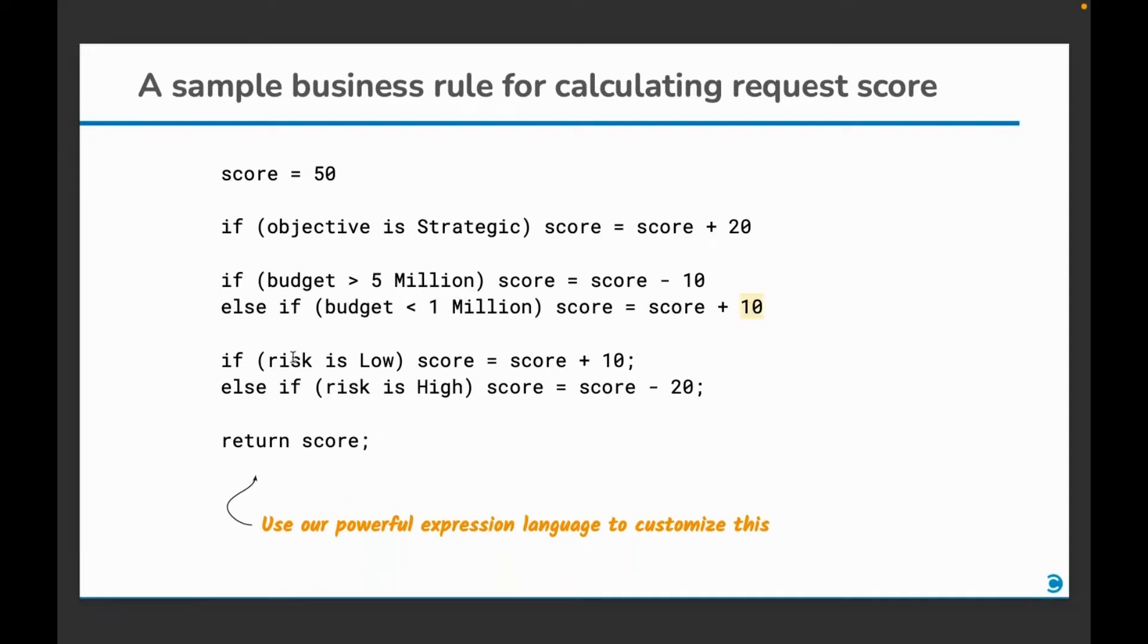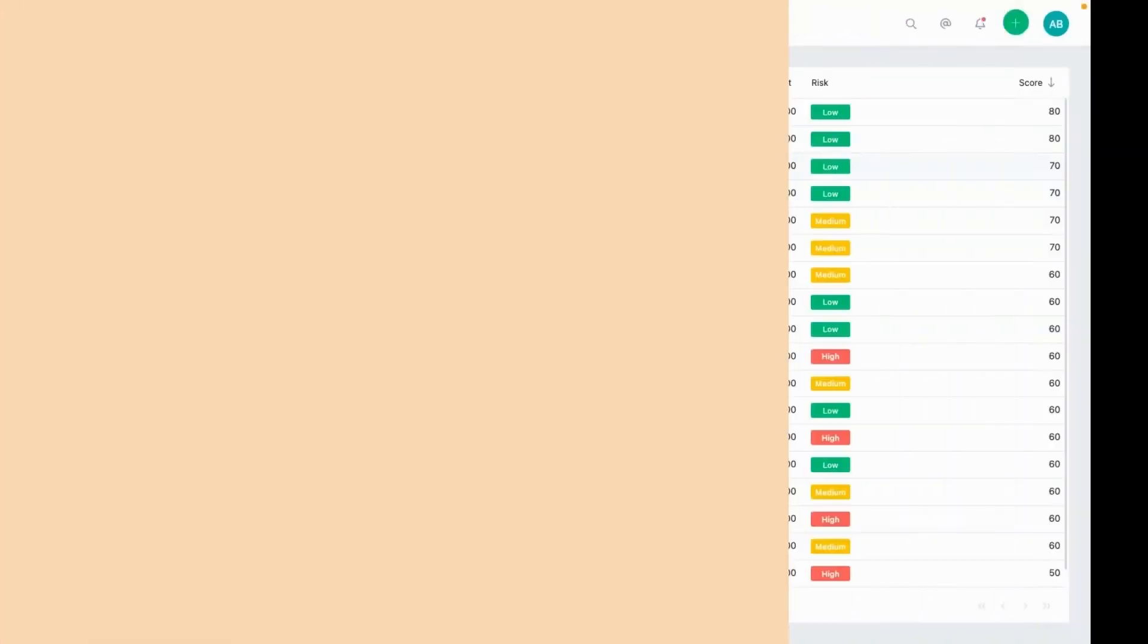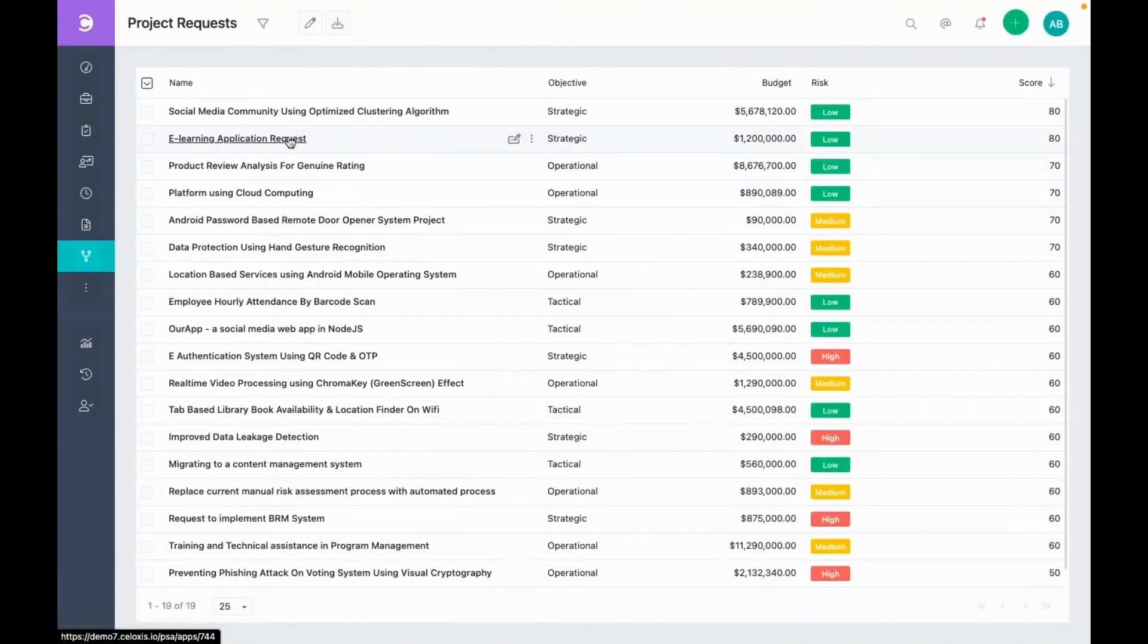And lastly, the risk. If the risk is low, then we add 10 to the score. However, if the project is risky, then we deduct 20 points. This becomes the final score of the request. This was simple. However, you can make it as sophisticated as you need. Let's have a look at a certain project request in detail.